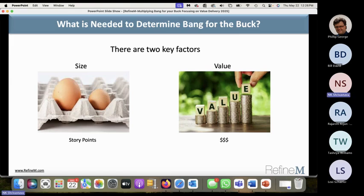Similarly, when teams do story points, team members, based on their role, may have different thoughts about story points. For a developer something could be 3 story points, but for the tester it could be 8, or 13, or 1. So there is a variation. Everybody has their own aspect. If you ask a developer, he will think from the development perspective; if you ask a tester, he or she will think from the testing perspective. Sometimes a developer has to write just 3 or 4 lines of code, done in an hour or less, but the testing team may have to spend 2-3 days testing, or the other way around. So there will be different aspects.